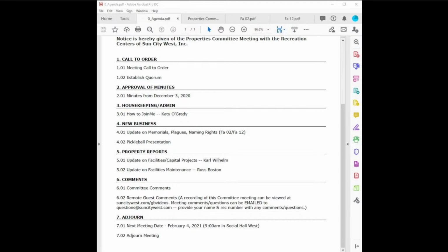That stage would be two parts. This year is about the design conversation and the cost associated with just designing such an idea, and then the next year, whatever committee membership is involved, would be about the appropriation of full funding for a project if it gained traction. Okay.